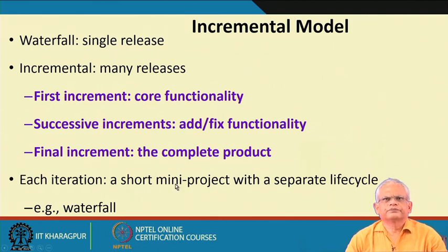Of course, each increment or iteration is a short mini project with a separate life cycle. For example, for each small increment, maybe a waterfall model can be used.